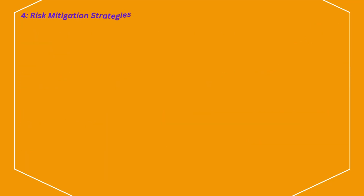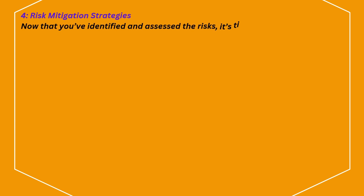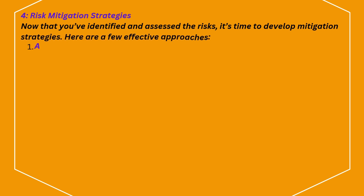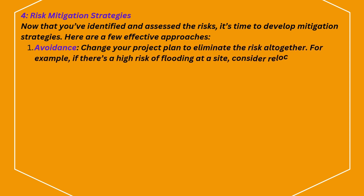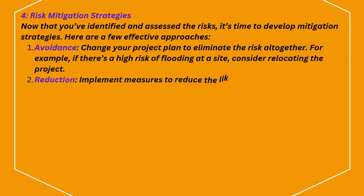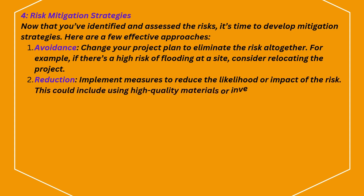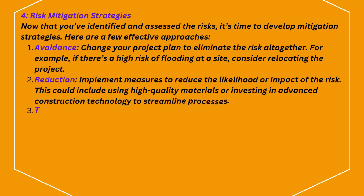Risk mitigation strategies. Now that you've identified and assessed the risks, it's time to develop mitigation strategies. First, avoidance: change your project plan to eliminate the risk altogether. For example, if there's a high risk of flooding at a site, consider relocating the project. Second, reduction: implement measures to reduce the likelihood or impact of the risk. This could include using high-quality materials or investing in advanced construction technology to streamline processes.